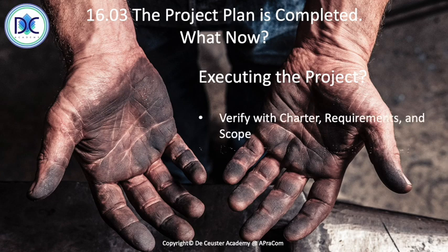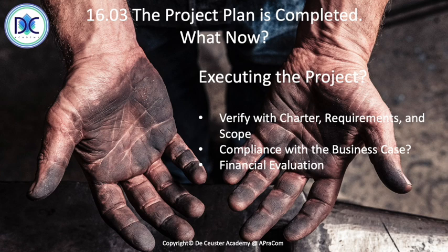First of all, we have to verify with the charter the requirements and the scope. We have to verify the compliance with the business case. Then a financial evaluation is necessary. We also have to review the risk level of the project at the end of the planning. And when we are lucky, we can get a final approval and go on and start with the project.